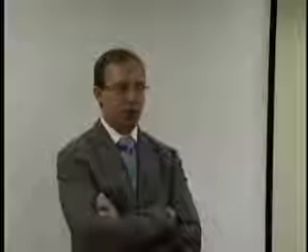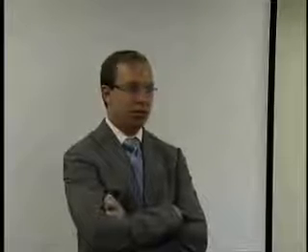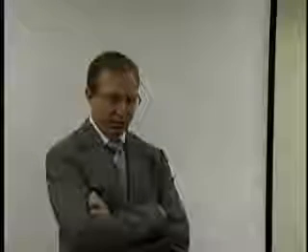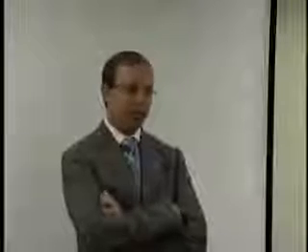They only hurt you. Well, if you're trying to lien for something that's not in your contract, you're not going to be able to do it. So, for instance, if your contract says that I'm going to be doing A, B, and C, and now you're trying to lien for D, E, and F as well, unless you have something in writing or you can prove that there was a contract for those items, you're not going to be able to lien for it.